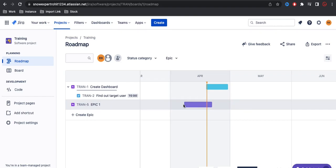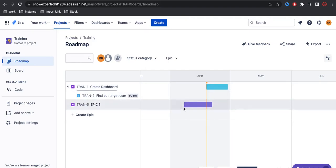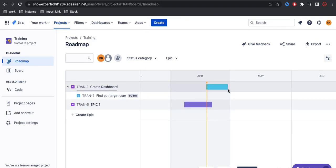Similarly you can select any of these dates and it is showing that this epic will start here and this epic will end here. This way we can define and understand the roadmap — when this project is started and when it will end. For example, the 'create dashboard' feature will end on the 4/29 date. So on this date I am expecting that this epic will be done.